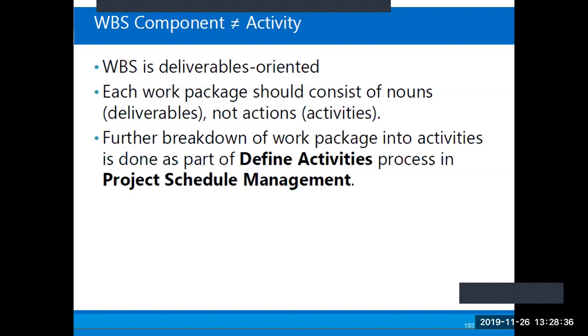Okay, here we have the work breakdown structure. It is deliverables oriented. So work is technically broken down, not just that you take a hammer and hit and scatter the work. It has a technical, logical breakdown approach, and each breakdown structure should relate to the deliverable, because the deliverable is the goal point in the management approach for the project. Each work package should consist of nouns, that's deliverables, not actions or activities. Further breakdown of work package into activities is done as part of the define activities process in schedule management.